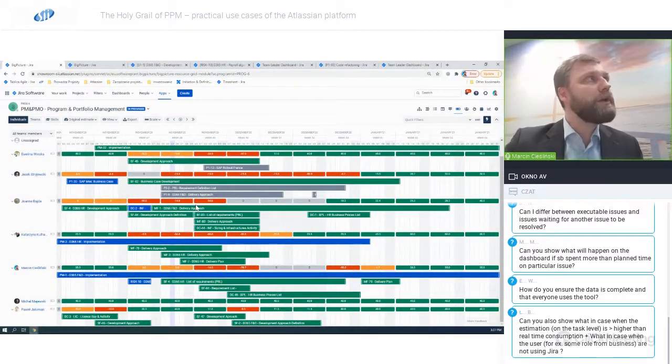Now you can see 3 colors. The green color represents the information where we say the person is utilized up to 75% of their utilization. So this person has, let's say, 23.3 hours left, and that's fine. Within that week, it is less than 75% of their utilization.